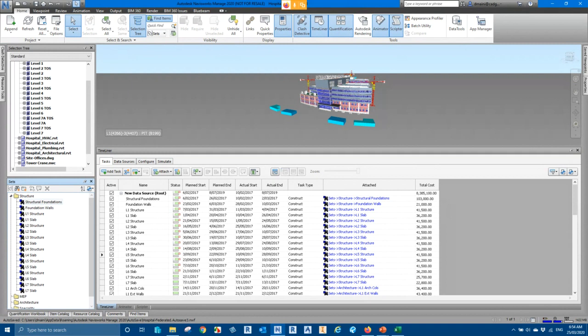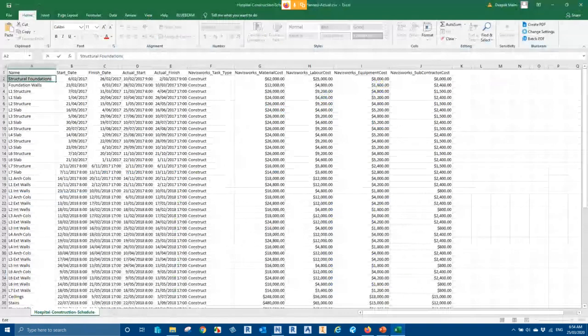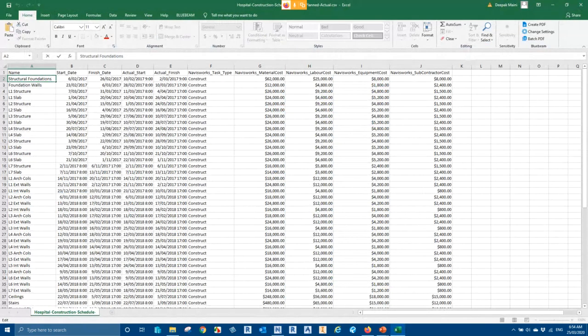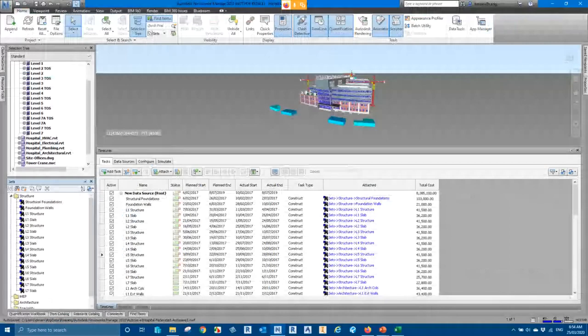Again, a problem that we found was that when we copied and pasted the names from the task, there was an extra space here. And that extra space got copied in the sets name. But when we mapped these columns, that extra space did not appear in the task name here.